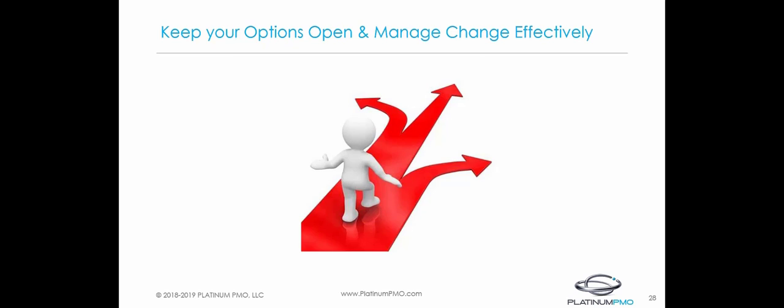When a client approaches you with additional requests, start by reminding them what your original scope of work entailed and then present them with two options. You can either add to the requested work for an additional expense, or you can agree with the agreed upon scope of work. This gives the client a simple choice and you won't lose out on your own time and compensation. When you are up against scope creep or managing a dynamic project, effective change management is crucial for success.